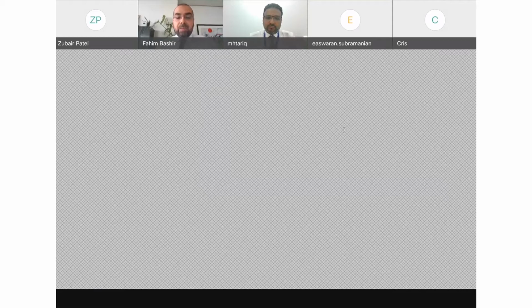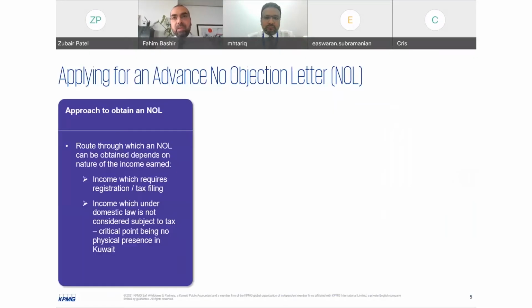So what happens is that once you have made the request, the tax authority will issue a no objection letter. This can be contract specific. So the idea of the no objection letter is that it will be contract specific, and it will be amount specific as well.